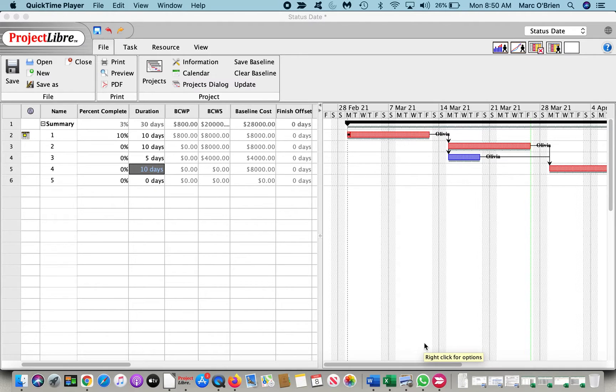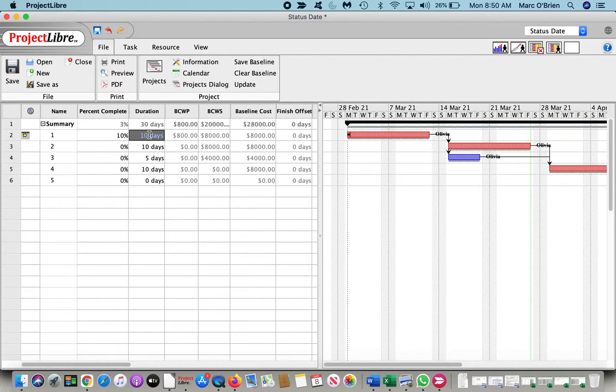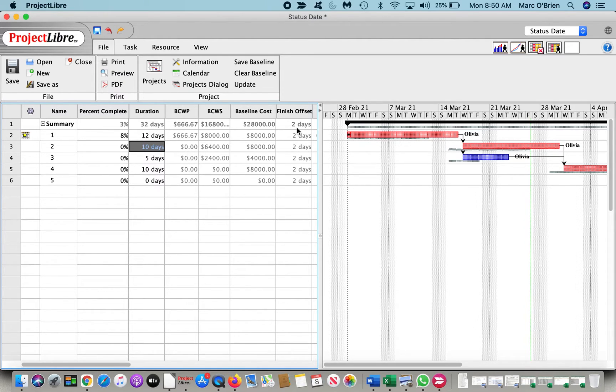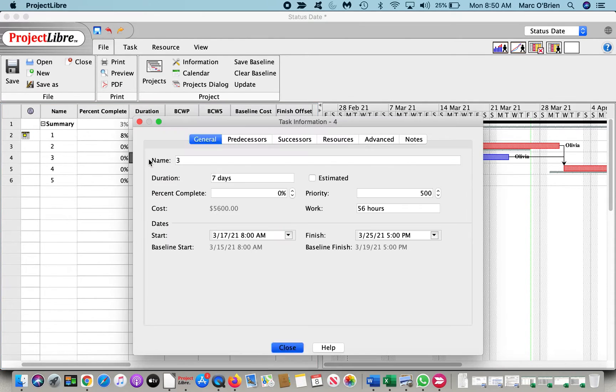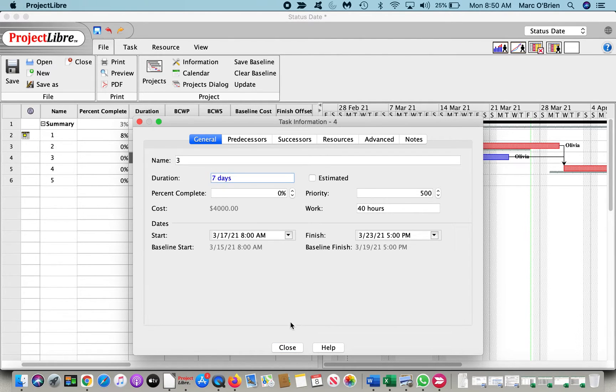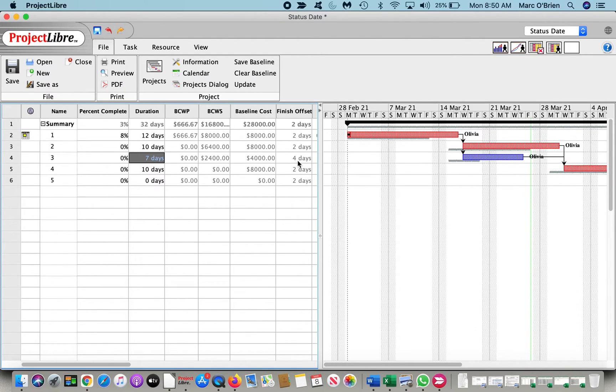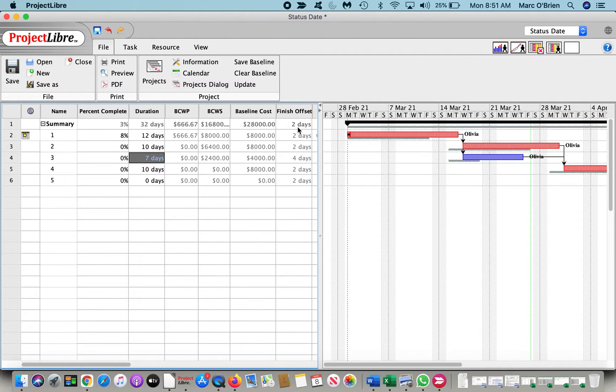A couple of wrap-up items. I put the finish offset column in there as well. Let me come through on our task one and change it from 10 days to 12 days. What you can see when that extends is the project finish has now been extended by two days, and the tasks have been extended by two days as well. If I go into task three, and instead of seven days, instead of five days, I make that seven days. I can close that, and we can take a look again. It's been extended. However, even though task three has been extended by four days, or by two days, for a total extension of four days, because it's a non-critical task, it actually does not affect any more of the offset on the finish of the entire project.